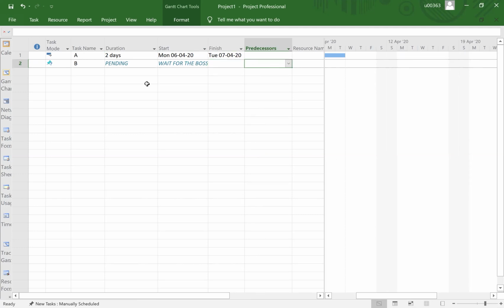And then at the end of the day, when you confirm that is the value that you want to input, you just simply convert into the automatic scheduling and then use the right formatting, meaning the Microsoft Project format, in order to input specific detailing on each of the columns. So you are ready to go. That is the difference between automatic scheduling and manual scheduling.